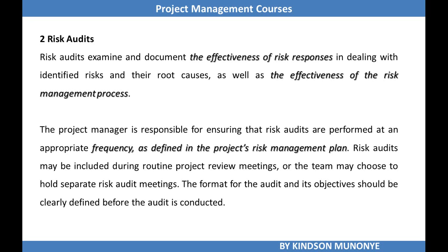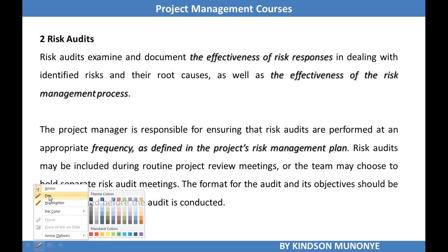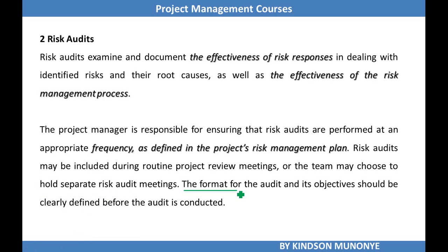The project manager is responsible for ensuring that risk audits are performed at an appropriate frequency as defined in the project risk management plan. Risk audits may be included during routine project review meetings, or the team may choose to hold separate risk audit meetings. The format for the risk audit and its objectives should be clearly defined before the audit is conducted. So I'm going to highlight this statement so that you know it's very important.